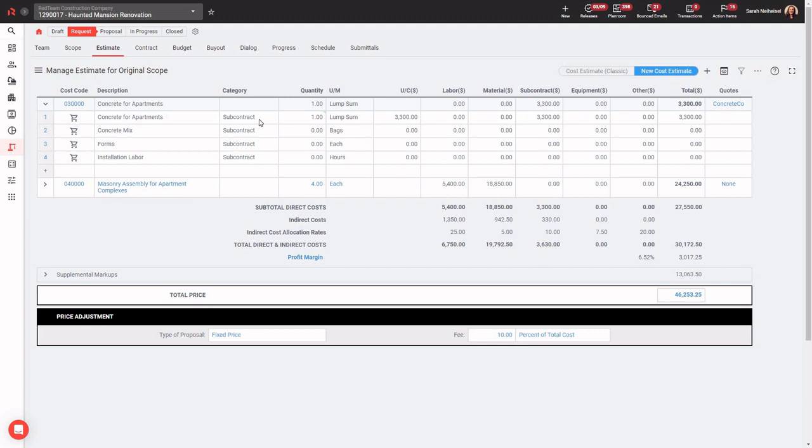And the reason that it lumps it all into this single line item is because, of course, we're not breaking down that vendor's bid amount by item. Your vendors are not required to itemize out their quote when they submit. They simply attach a copy and they give us the lump sum amount. So that's what you're seeing here. But of course, when you create their commitment, you'll still be able to itemize out that schedule of values for your vendor in this same way if you prefer.